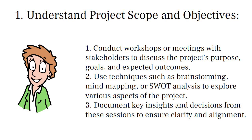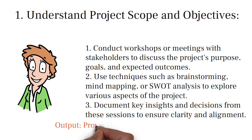The output of this first step — understanding the project scope and objectives — is your project charter, which outlines the purpose, the objectives, the scope, and the high-level requirements. That is going to be your first step.